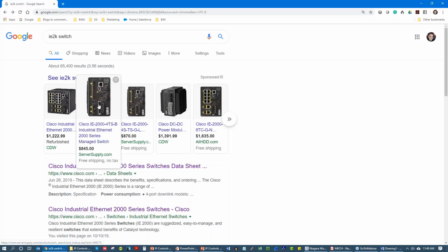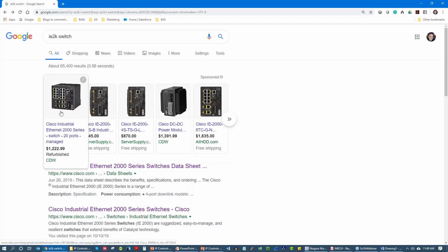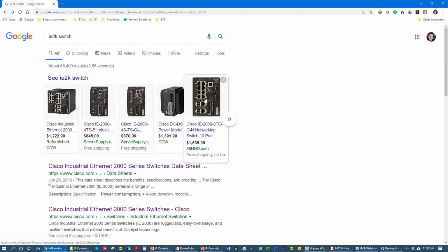But what you do is you either charge them to the job or you keep them in your business, depending on how many IP controls jobs you do. And you put these on site and then you connect everything up to them as if they were a customer switch. And because we're using IP controls and because we're not going to be doing a whole ton of star pattern, most likely, with a solution like this, we can have our rings come out of the ports.